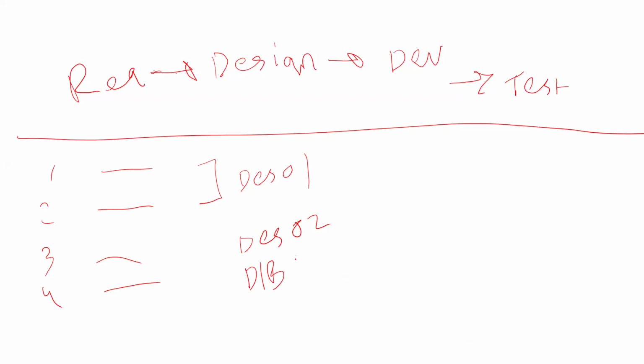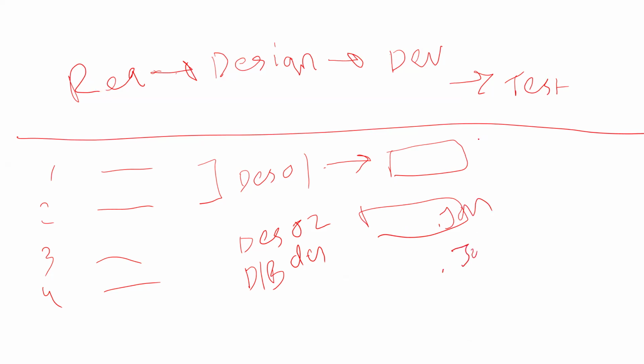Wherever you have done this design aspect, it needs to reflect into the development. This was done in the .jar file, this was done in this Java file. This was then reflected into the testing. So each requirement you have captured at the start of the project needs to reflect into some test cases, which ensures that till the end you are tracking it.